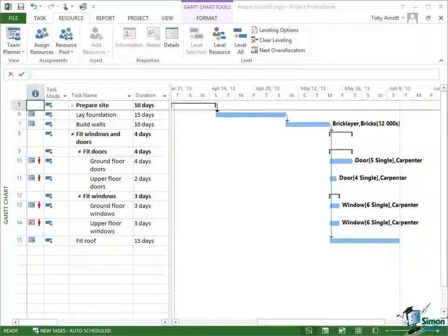But it is very important always to bear the simple solutions in mind. It may well be that manually rescheduling one or two tasks, or just getting some extra resource for a period of time, can solve a scheduling problem. Rather than make the scheduling extremely complex and try to make a schedule fit when it's just destined not to, just getting a little bit of extra resource, or looking for the simple solution, is very often the best way of solving scheduling issues.